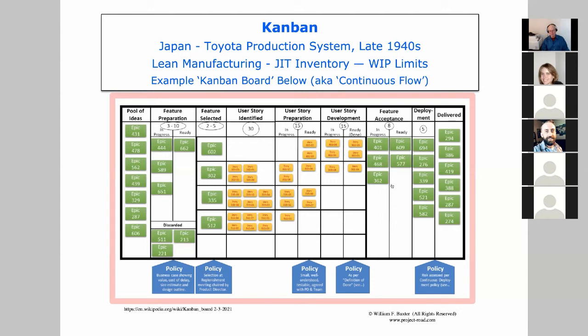And if we've come to a screeching halt here, all the flow through here is going to tend to come to a screeching halt too, because the work here can't flow on, new work can't flow in. You have work in progress limits that start to create stoppages all throughout upstream of this problem. So now the resources that are idle here can all be directed to looking at the problem here, figuring out together a way to solve it.